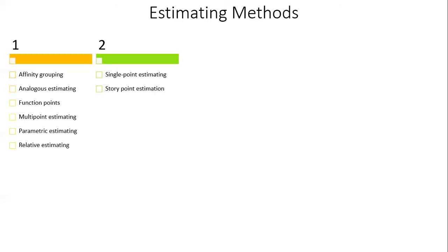Story point estimating involves project team members assigning abstract but relative points of effort required to implement a user story. It tells the project team about the difficulty of the story, considering complexity, risks, and effort involved. Now, when you talk about story points, remember not to equate story points to days or hours or things like that. Story points are meant to be an abstract way of measuring by taking away the concept of duration and focusing more on the complexity needed to get the work done and the effort.